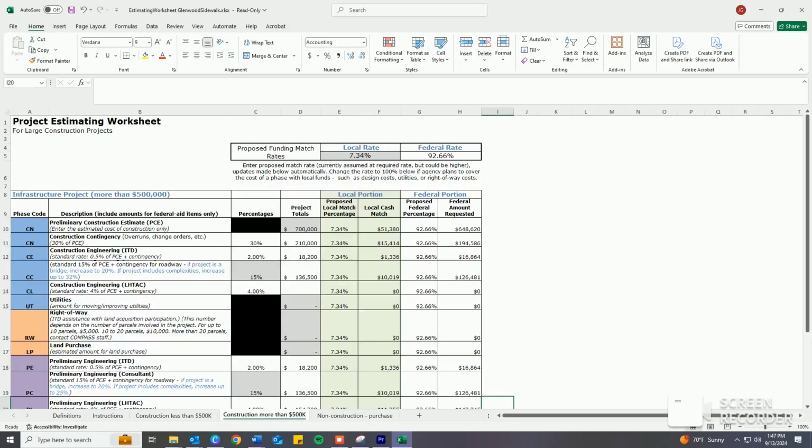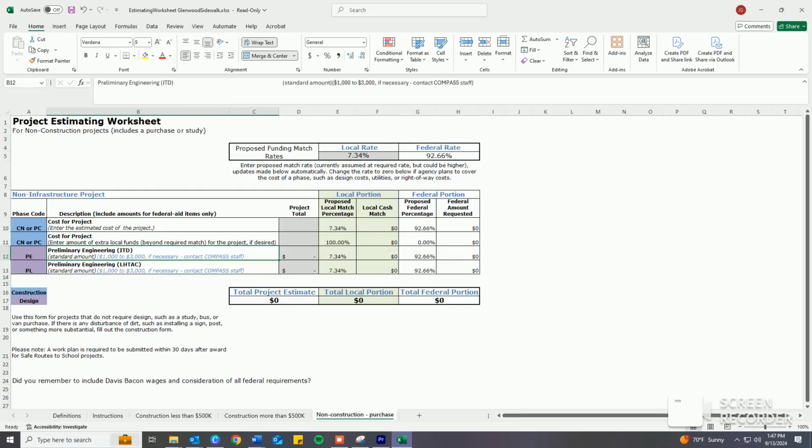White cells may be changed if you are directed to change based on specific criteria, but it will typically fill out automatically using formulas. When you are entering costs, be sure to consider risk factors and complexities that could impact your project and increase the costs. It is better to add some contingency to your estimate to cover potential risks.